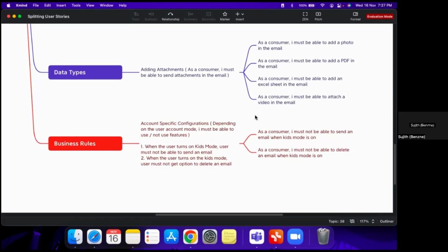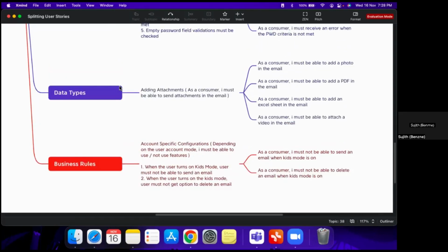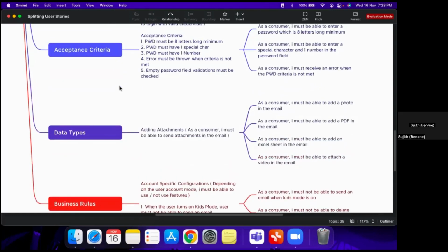Again, stressing what Sudha mentioned, the idea here is not to fill the capacity or show the management. The idea here, as we discussed with the activity which we did, is to get feedback from the customer. Your sprint duration will never change, but your requirement will change, right? If it's a small requirement, you can finish it in one sprint. If it's a big requirement, break it into smaller pieces logically, where you can deliver something which is working software to your customers or your consumers and get feedback from them.